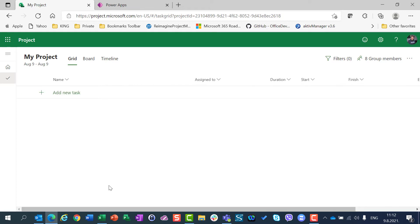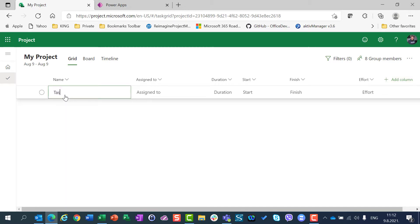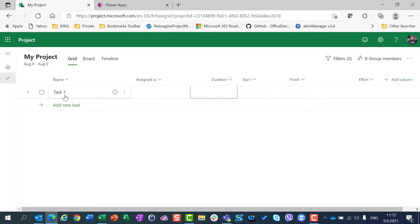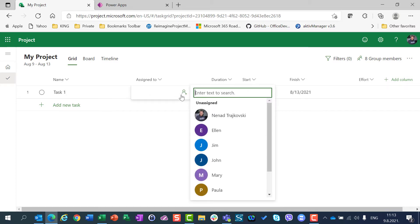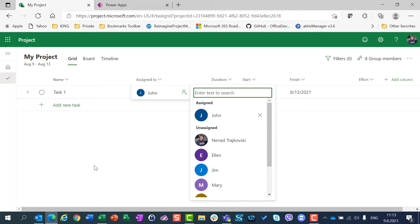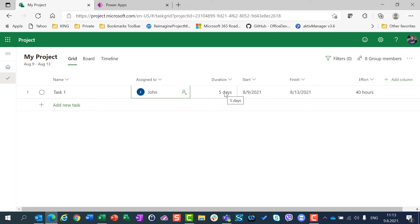I will now add task 1. And let's say that task 1 has 5 days duration. Remember that by default, task type in Microsoft Projects for the web is fixed duration. And I am going to assign John. John works from 9 to 5, 8 hours per day. So, effort will be 40 hours. Why? Because John is going to work 5 days, 8 hours per day. And it results in 40 hours.